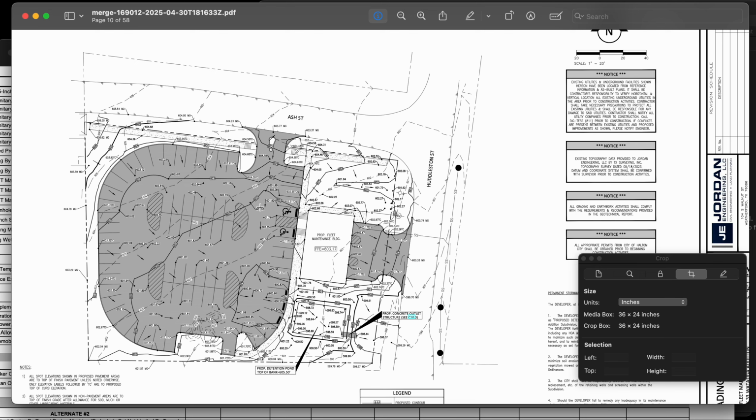We saved, and of course all we did was adjust the price to prep the soil by $1 or $2. So we went up maybe $5,000, $10,000. But that $5,000, $10,000 included the price to just move the dirt away from the job site and for us to grade it out.